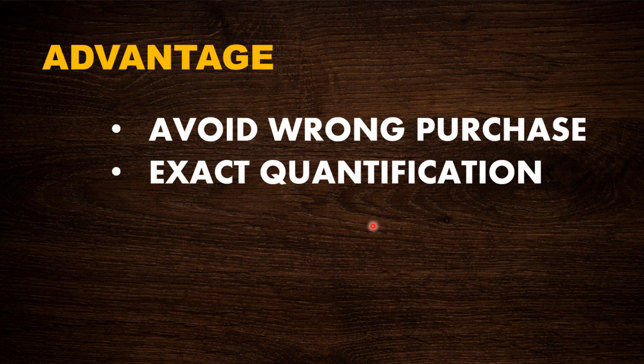If you don't have the figure, how do you know how many pipes are required? Sometimes you will have 10 drawings, sometimes 20 drawings, sometimes 100 drawings. Unless you quantify all of these drawings, you will not be able to know. So it's really important to quantify. This list of materials will consist of the quantification, which is why it is very important to have this document: it avoids quantification issues.